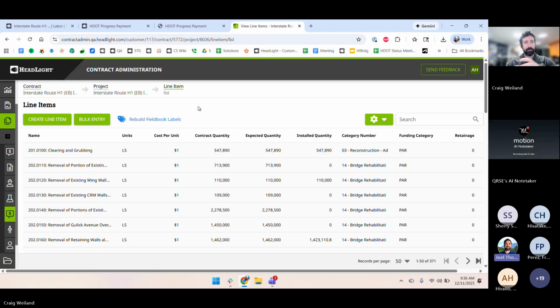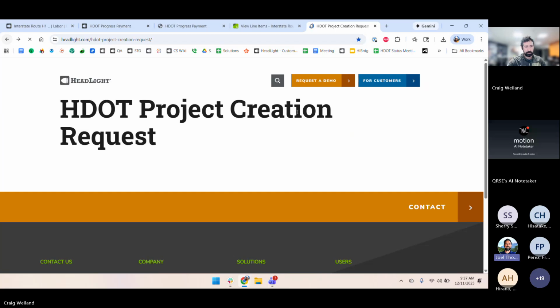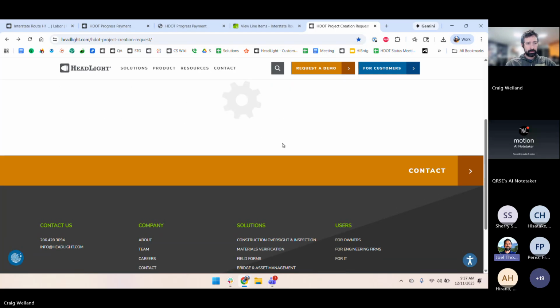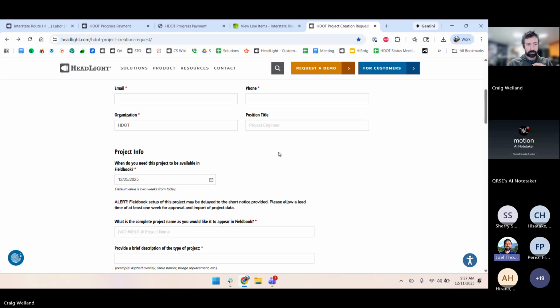Okay. I was just going to add real quick, Craig, that I know looking at that form, there's a couple of things in there, and I think most people know, but as far as where do you find the project number for the project and all that stuff, just look at the cover sheet of your drawings. It usually has the precise exact project number. If it's federally funded, it would start with a FAP.